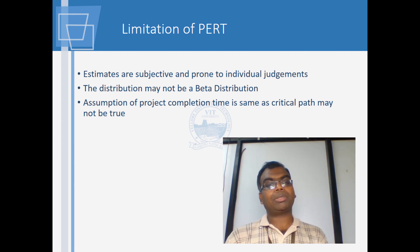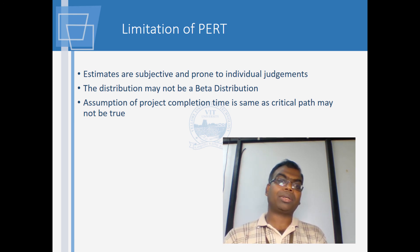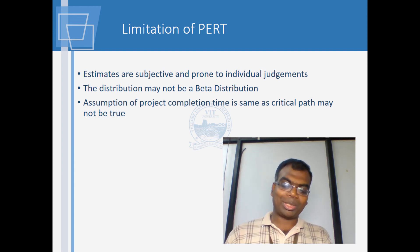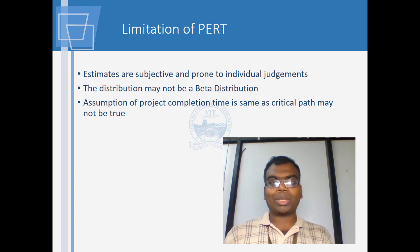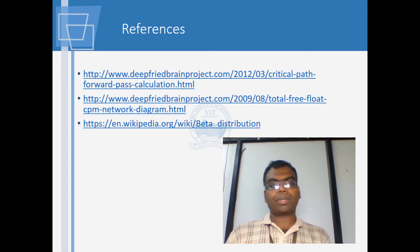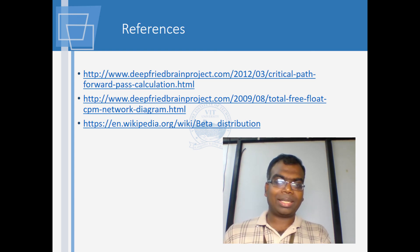Further, the distribution may not be a beta distribution at all — we showed many curves and assumed beta distribution, but there is a good chance it is not. Also, the assumption that project completion time equals critical path time may not always be true, because a non-critical path can become critical due to lack of focus during project execution. Here are some references used in this presentation. Trust you found this useful and all the best.